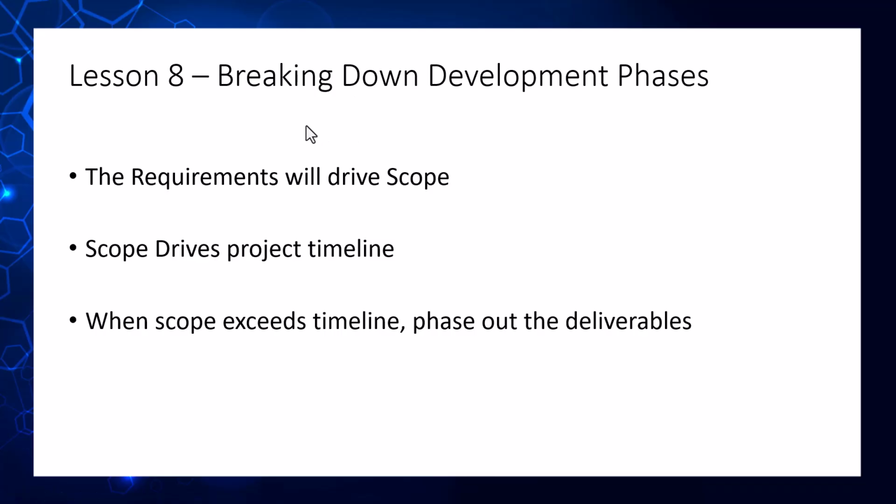Maybe as you're going through and there are 10 items on the enhancement list, you say, well, I would like to at least have some of these done. You can always see how we mix and match what we put in scope and pull out of scope so that we still hit our 6-month development timeline or whatever it is that we need. So keep in mind that how we change the scope is going to drive what our project timeline looks like.